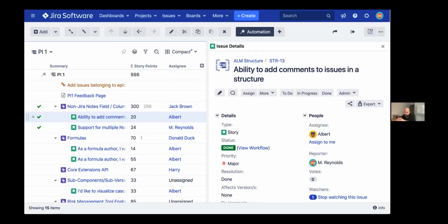simply put in a structure. You can throw that all together and just say, hey, these are the epics that we're doing in this PI. These are the stories that go with it. These are the statuses. These are the people that you need to talk to about those particular stories. And that's it, right? That's all you need. You can add story points if that's something that you're currently tracking, right? Are we doing capacity planning, making sure we have enough capacity this sprint to do it now, or do we push it later? And like I said, you can throw Confluence pages in there. That's a little trick that I've seen very, very helpful.